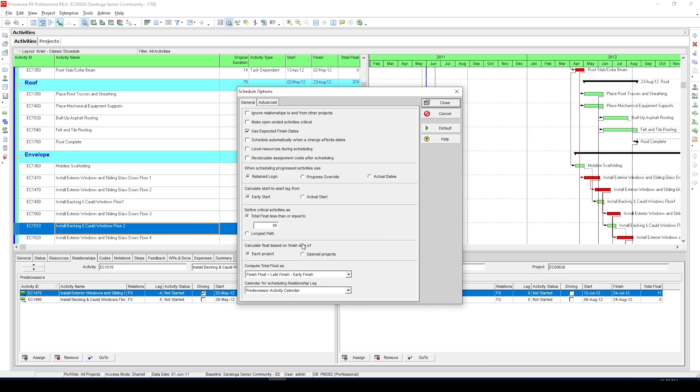This time instead of relying on our total float definition, choose the longest path option to define the critical activities. Several scheduling experts have said that this is the better of two options.